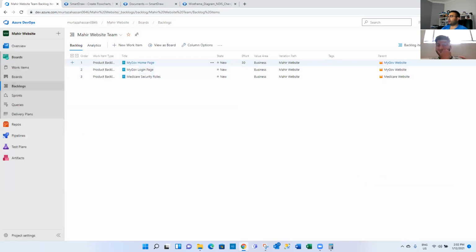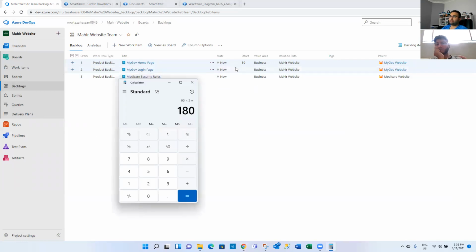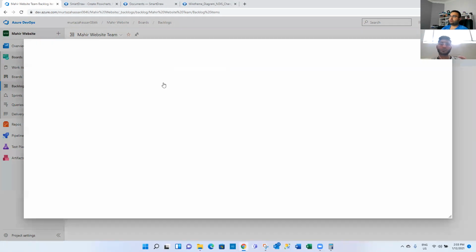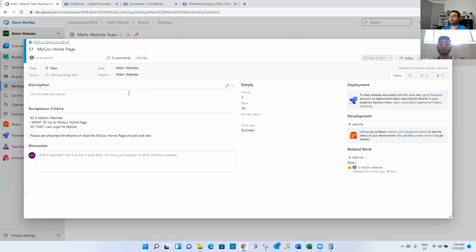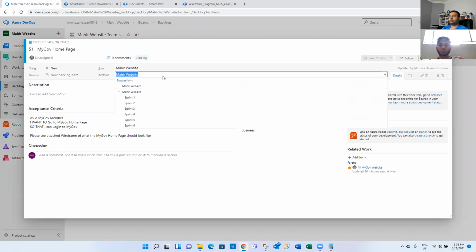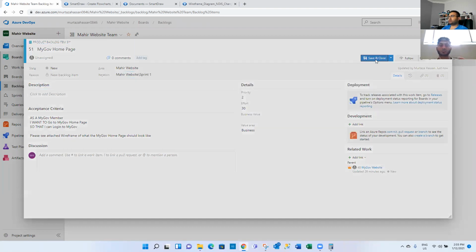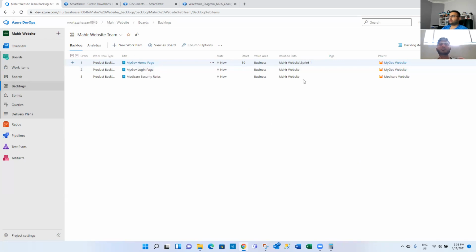So now what happens? We're back to, all right, it'll take 30 hours, right? So now what we do, we have 180, we minus 30. Now we have 150 hours available. You got what I mean? So what we do, we go MyGov, one developer will take this, so we'll add this to the sprint 1. So, right? So it's in sprint 1.